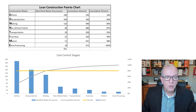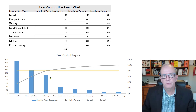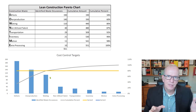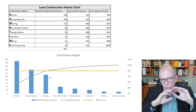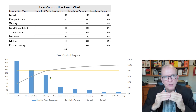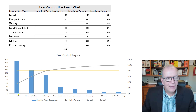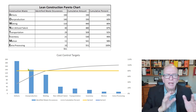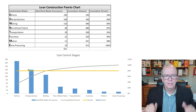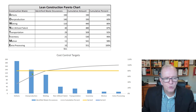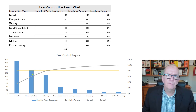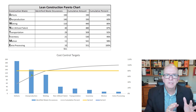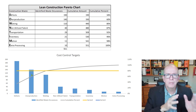We can look at problems coming up on our projects using PPC — Plan Percent Complete. Which activities did we expect to get done this week, and which ones did we not end up getting done? Of those not completed, what category are they in? We would likely see a pattern where certain areas are much more pronounced, giving us a clue as to where we should focus our efforts. If there's a systems problem in an area, let's improve the system to reduce problems there.